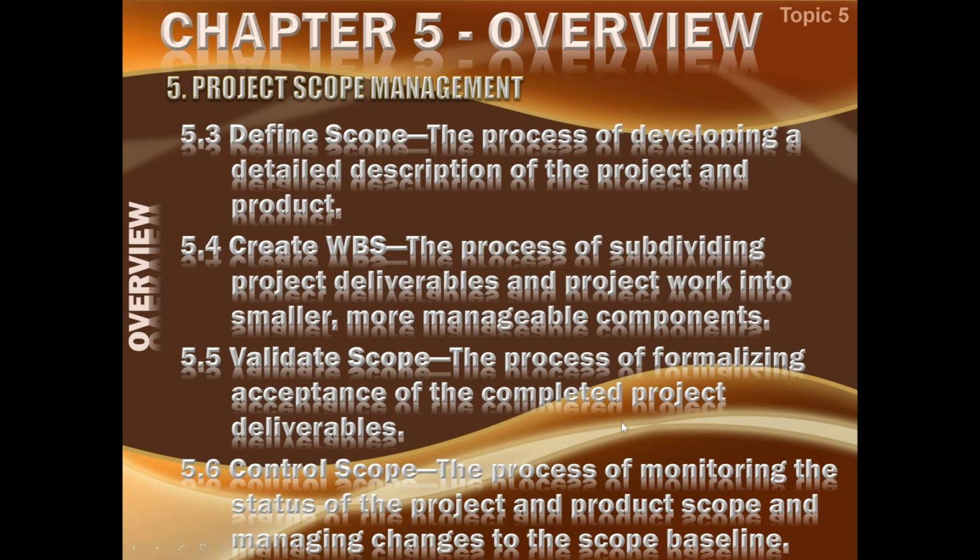When we go on to monitoring and control, validate scope is the process of formalizing the acceptance of the completed project deliverable, and control scope is the process of monitoring the status of the project scope and the product scope and managing the changes to the scope baseline. So this is